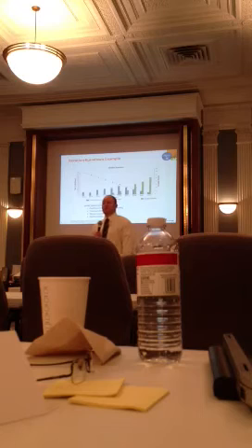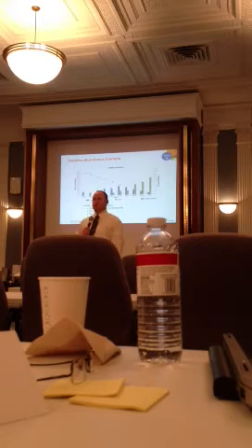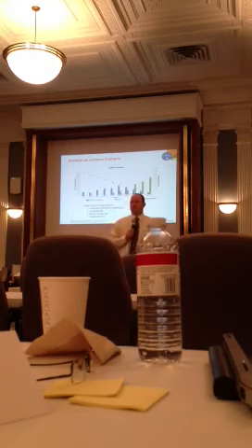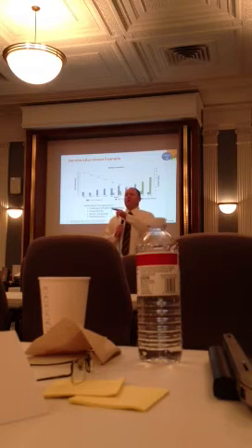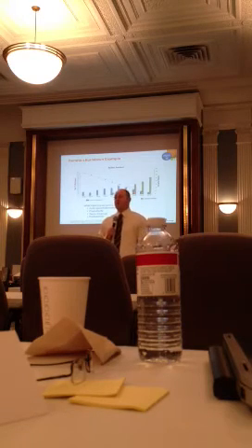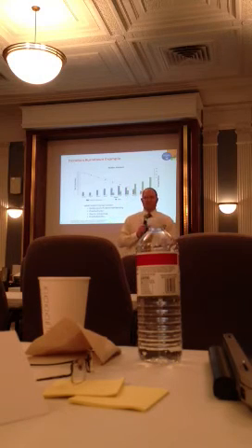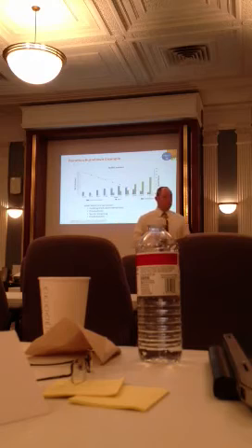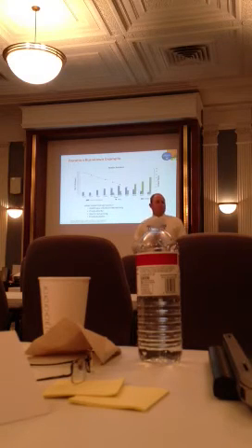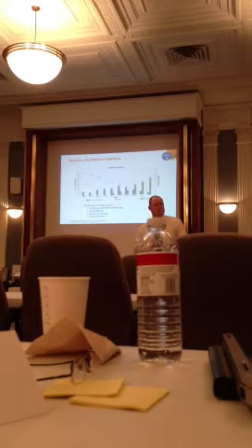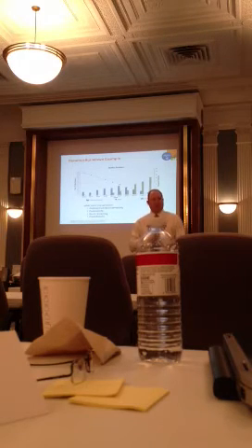So it's up to you guys as Scrum Masters to determine at what level you're going to make those user stories to minimize your risk of, I got 95% of the way through and didn't get acceptance on it, and now I'm stuck. Okay? For this iterative model, the Scrum Master can go to the product owner to say that instead of having the higher level of milestone, we can break down so that we can have acceptance each day. Right. So that you can get something accepted each day. You're going to break those down, and that's exact feedback that you give to your product owner.